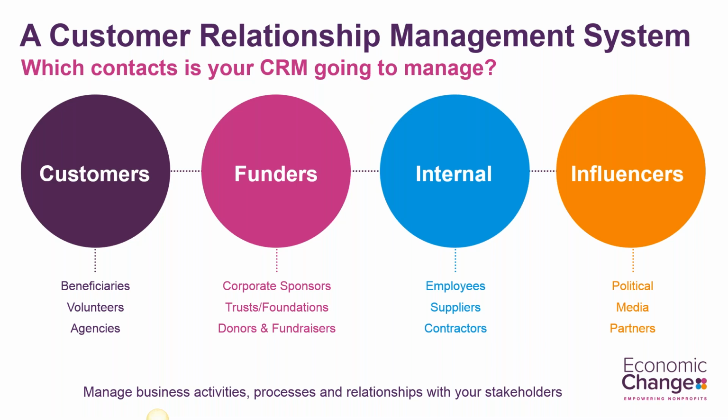It might be part of your staged rollout process. We work with clients regularly over a period of time where they'll implement the CRM initially for fundraising, and then they'll move it into another department for program delivery, and then another department for volunteering. So the organisation will see the big picture, but then they'll do a staged rollout where they work through and evolve Salesforce to accommodate their needs at different points of the journey. And that's definitely a good way of doing it.